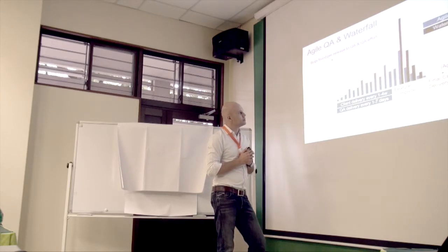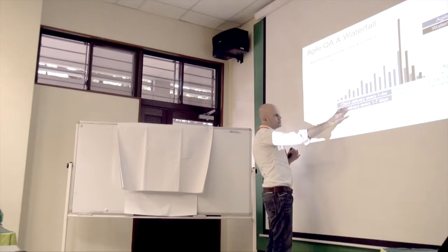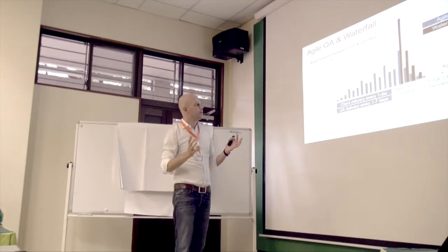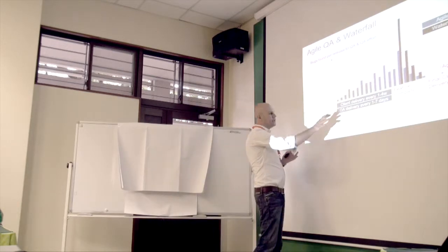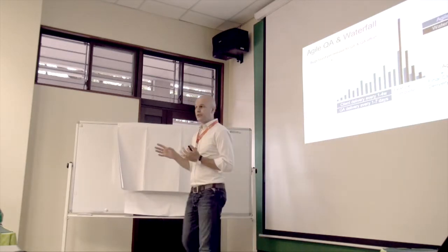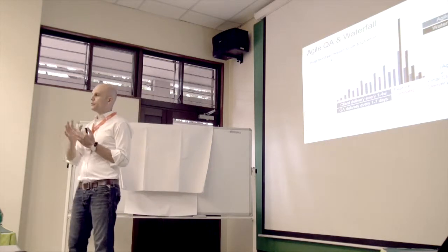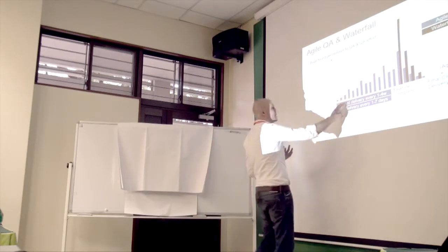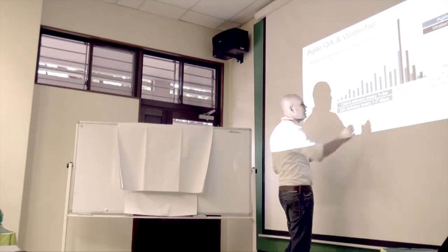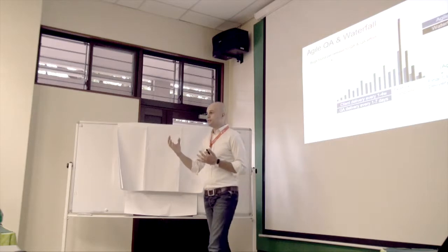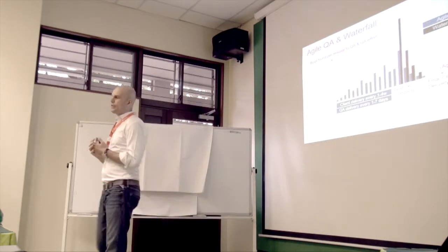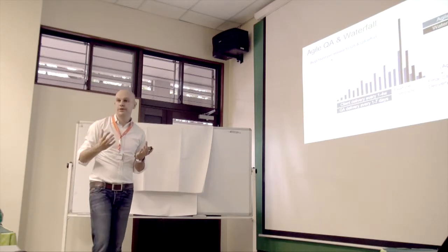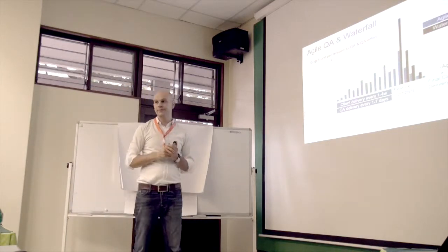And as I said before, the big thing where I saw a really good impact of Agile regarding the quality is that in the beginning we developed the core features, the most important ones for the business. And then we move on to the other ones. So it means that the core features, when we do regression testing here and here and here and here and here, we retest those core features many times. So we make sure that they work much more than you would in a waterfall model, where you verify it fewer times.